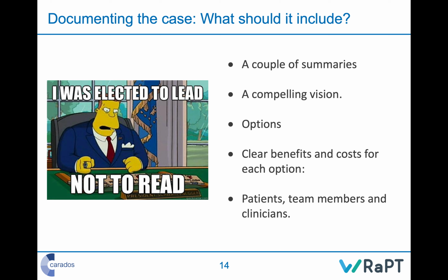You should include some options. A good business case would include some options to give people a degree of choice. Options should include a do-nothing view. You have to realise that whatever you put in front of people, even what you think is perfect, may not be perfect given the political environments that you're working within. So any business case should have a number of options, including a do-nothing, which would say this is what will happen if you don't make a decision.